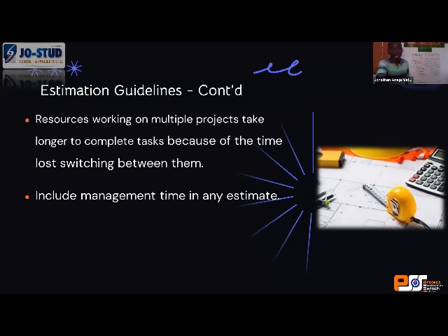Another one is to include management time in any estimate. I look at management time in 2 ways. When I'm estimating, sometimes you may say that if my mason finishes working by 5, or he works for 2 days, on the 3rd day I pay. You may send payment to the office, depending on how complex the organization is, and the delay in making payments. You have to factor that time in when you're estimating, especially for time. Now you can send payment to the bank and it takes 3 days for them to get the money. What if it takes 3 days and they are off? You have to factor that side.